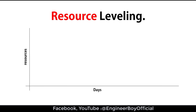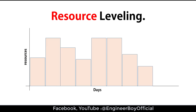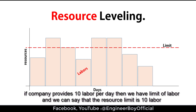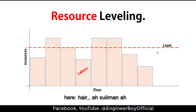I'm going to draw a graph of days versus resources, where these resources represent labor. We have a limitation from the company side — an activity needs 15 laborers but the company can provide only 10 laborers per day. So 10 laborers is the limit the company can provide. We have that limit shown here on the graph.